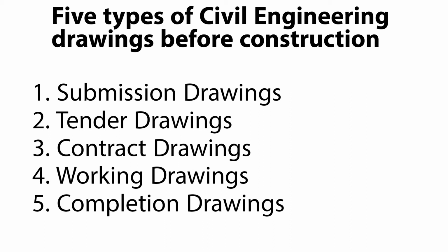Third is contract drawing. The engineer can carry on with detailed design only after the completion of the tender process. If tendering has been straightforward and without any alternative proposals, the contract drawings will be the same as the tender drawings.